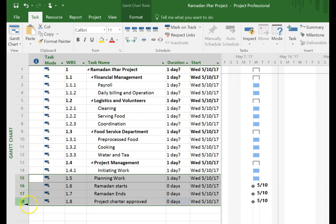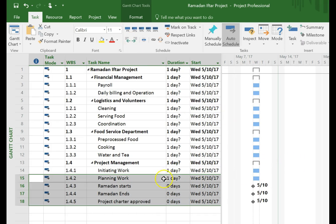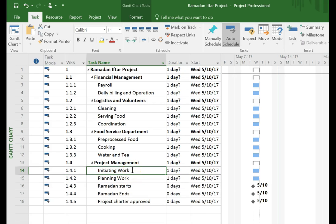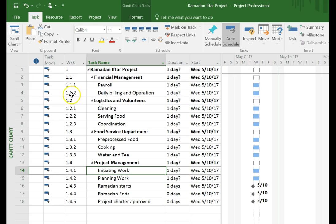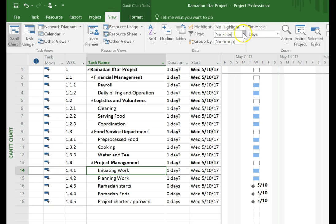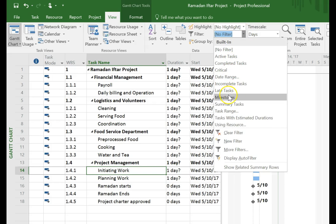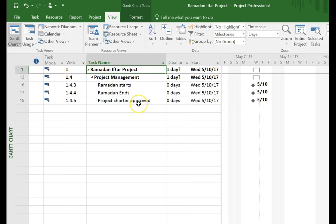I notice that these milestones seem to be at one level too high, so I'm going to move them over. The difference is that initiating work will have a beginning and an end, while the actual milestone with zero duration is the date the project charter is approved — that'll be the day the initiating work ends. I'm not going to worry about getting the milestones in any particular order at this point. I'll go up to View once again and filter by just milestones so I can see only the milestones in my project.